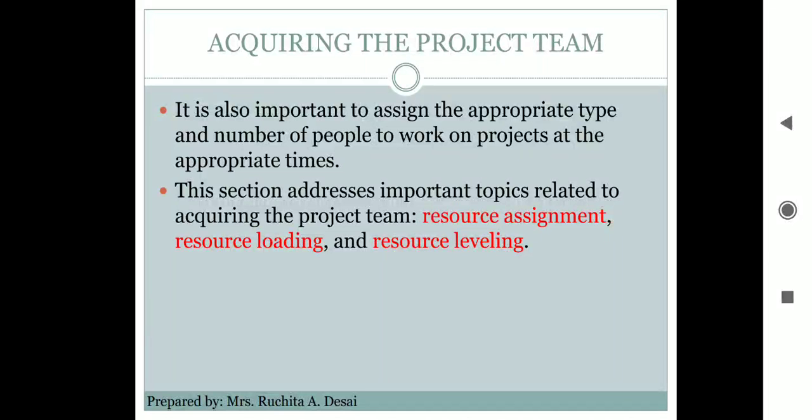The Human Resource Management Plan is the first input to this process; it tells us how, when, and what type of skills we need in a project. The second input is Organizational Process Assets, which covers procedures for hiring people and the time periods for publishing vacancies. These are the basic inputs required for acquiring the human resource for a project.